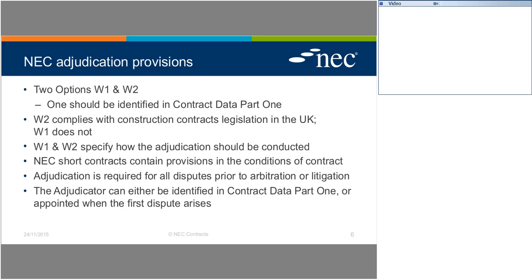Firstly, at the outset, you're hopefully setting off not planning on having any disputes, but certainly you won't know what the dispute will be about. It could be a legal dispute about the interpretation of the contract. It could be a geotechnical matter to do with ground conditions. It could be to do with steel design. It could be to do with the finances of construction. So you're better off waiting to know what your dispute's about so you can find the right person.